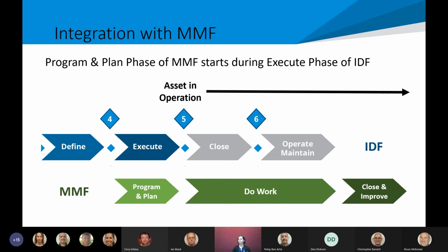Yeah. Because once again, we want to get to the back end where we're trying to identify resources in the MMF. Yep. That's my concern here in this graph. Yeah, so it's a question of certainly in the IDF, in the business case, identifying resources at that point as part of the business case and doing the whole of life costs. So probably what we need to look at, it's a really good point, is whether that is enough to flag that early.